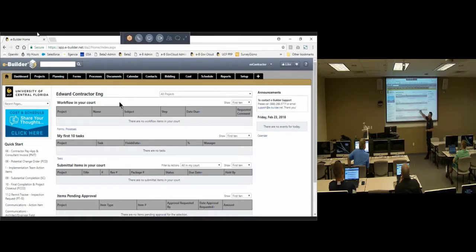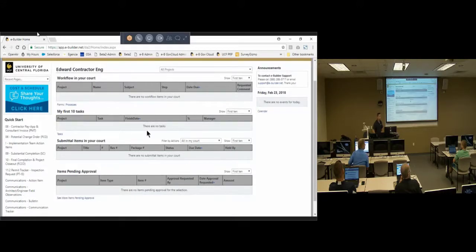He's going to have the ability to click on it and update the percentage complete on it. So if one of the project managers identifies you as a resource on that task, and as that date approaches, you will have an entry right here to update. It depends on the project manager and how they want to manage the schedule. They may make you a resource, they may not make you a resource, and they may just manage the schedule on their own. Make sense? That's just a notification of schedule item.